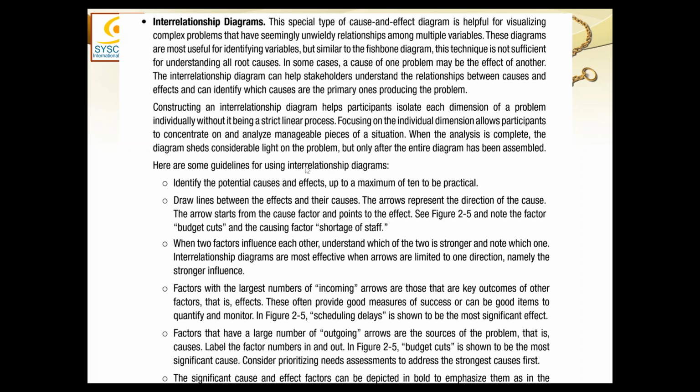Here is a guideline for using interrelationship diagrams. Identify the potential causes and effects up to a maximum of 10 to be practical. Draw lines between the effects and their causes.